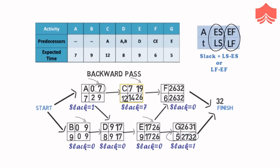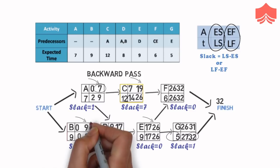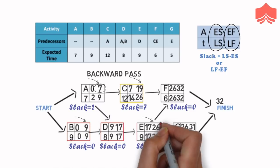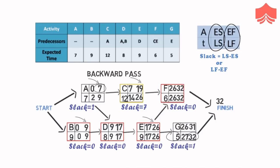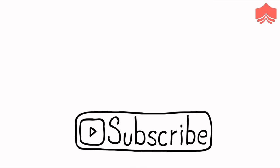All the activities with 0 slack cannot be delayed without extending the project completion time. All such activities are called critical activities. The path they form is known as the critical path, which is the longest path in the network. Here B, D, E and F form the critical path. So this was all about project scheduling and critical path. Make sure to subscribe to our channel for more such informative videos and visit our website to choose from hundreds of professional courses for your bright career ahead. Thanks so much for being with KnowledgeHut.